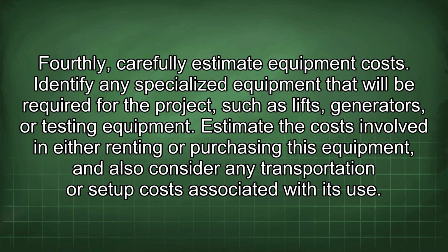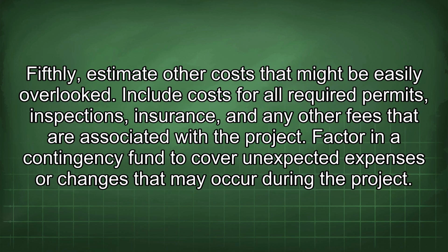Fourthly, carefully estimate equipment costs. Identify any specialized equipment that will be required for the project, such as lifts, generators, or testing equipment. Estimate the costs involved in either renting or purchasing this equipment, and also consider any transportation or setup costs associated with its use. Fifthly, estimate other costs that might be easily overlooked.